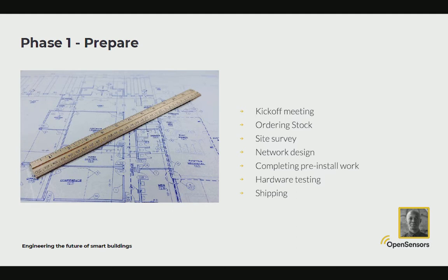So one thing we do at this prepare stage as well that helps to lower the risk within each project is to spend some time hardware testing each configuration that we're putting into the building. So feeding on from the site survey and learning as much as we can about the site's potential challenges, we also spend a period of time soak testing the hardware to make sure that it meets our standards, but also so that we know that when we get to site, it's easy for us to roll out, as well as scale, and then to manage the actual hardware as an ongoing asset management process.